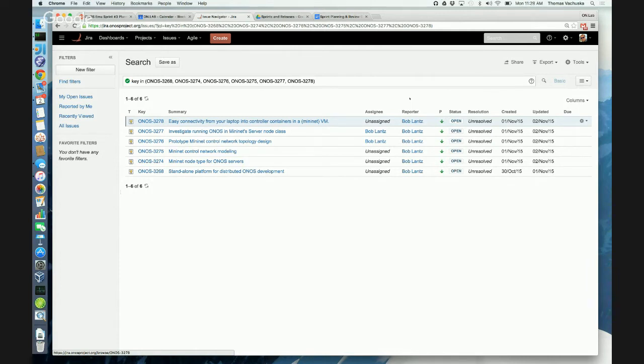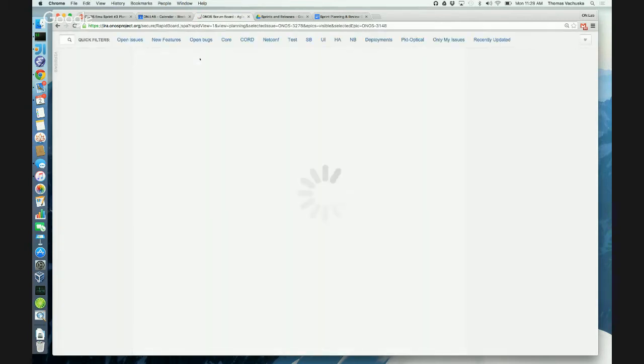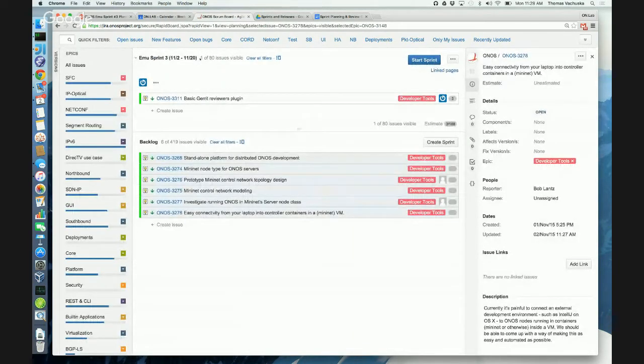So I tried. Maybe I'm confused on what to do here, but when I put these in, I tried to make it clear what was a user story, or a larger project, and what were smaller components. So I guess this is the general discussion about how we're using our backlog. Right now, we're primarily using it to keep track of bugs and user stories. That's it. Anything, even a new feature or enhancement, can be boiled down to a user story, and the reason we do this is to allow tracking the story points.